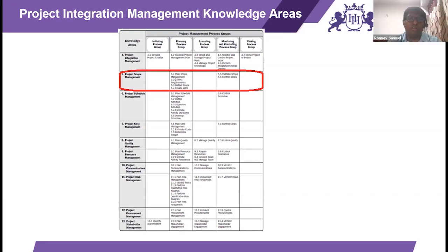Okay, I think I understand. There is something known as a scope baseline. You will have a baseline scope for that particular moment. As the requirements change, you will always change the baseline and put a new baseline. So with respect to the given baseline, if your requirement matches it, it is included. If it does not match, it is not included. If it is not included, there can be only two possibilities: we have to work on it, or we have to consider it a scope change.